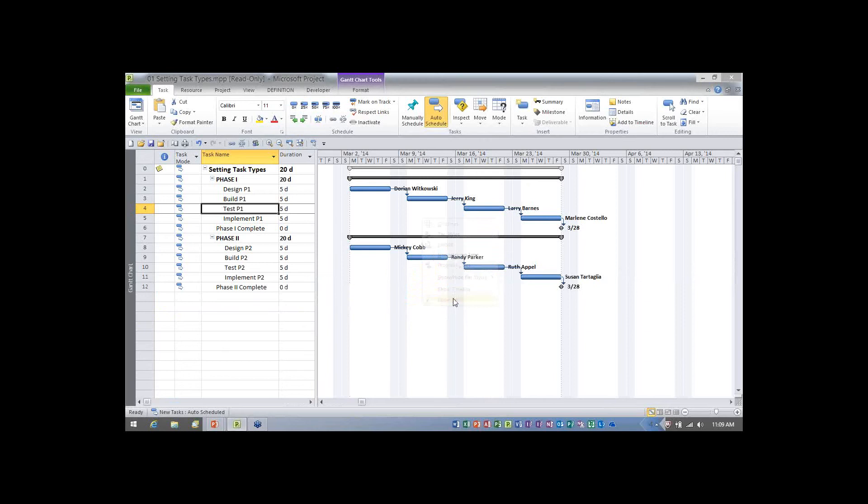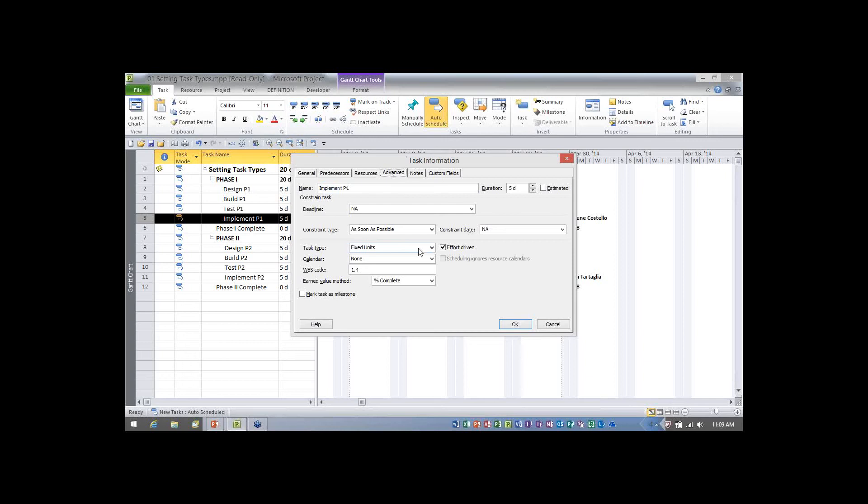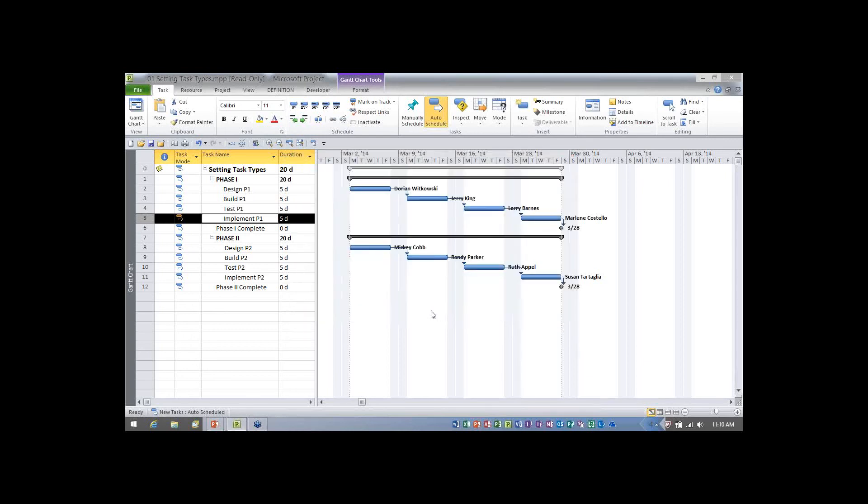Now let me show you the second method. I can also double click any task. So I'm going to double click implement P1. And when you double click a task, Microsoft Project will always open the task information dialog. In the dialog, we'll need to go to the advanced page. Halfway down the page, we'll see the task type item is listed. I can go ahead and click the pick list, and maybe on this one I'll choose fixed work, and then we click OK.